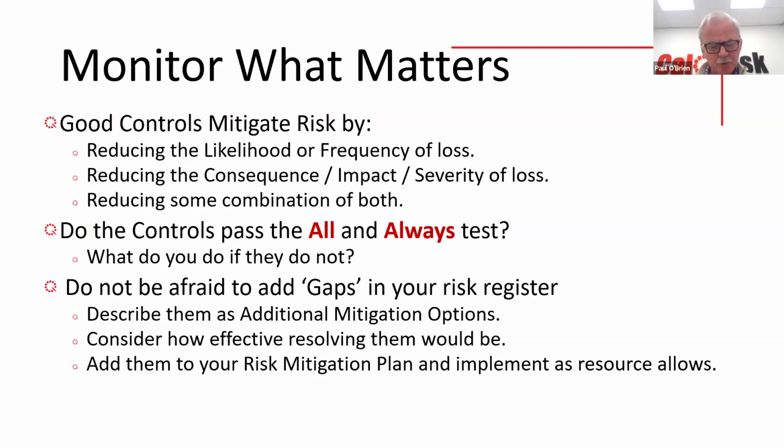They want to say they have no gaps. You're better off in risk management terms to identify the gap, make a resource decision, say, I don't have the resources to do that today. I put it on a plan for sometime in the future, but identify it and put it into the register. It's an additional mitigation option. If I want to reduce this risk further, I put it in here.